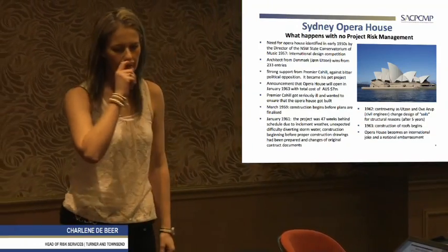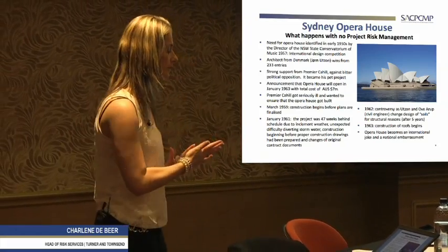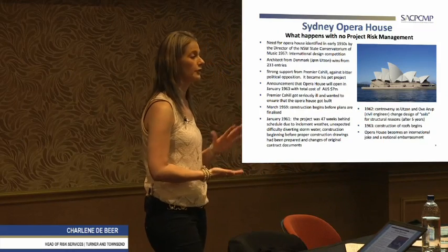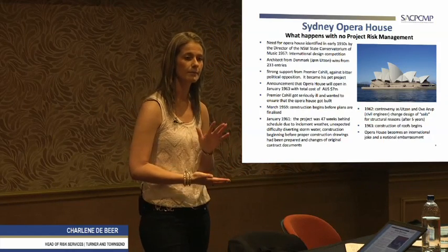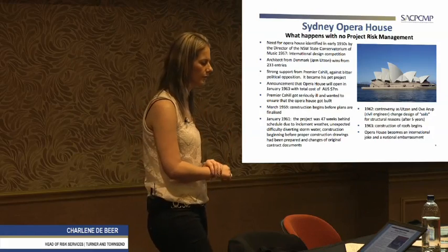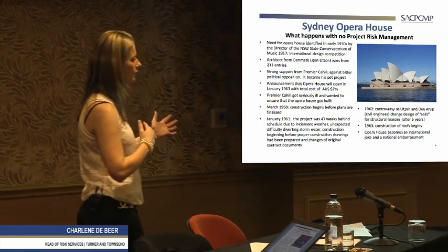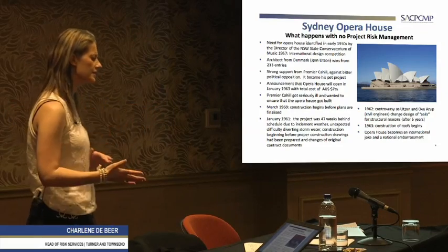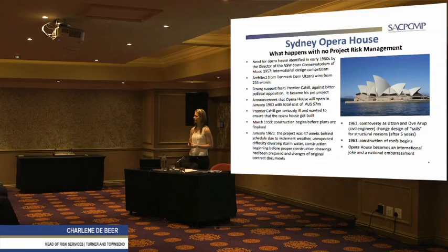So at 30% model review, these guys usually feel from engineering and the client and the contractor side that they need to get this project up and running. They're usually already behind on time, and budget is already under pressure and being constrained. And of course, there's a lot of pressure from corporate and strategy, saying you guys are taking longer than what you stated. So we've got to fly this job. 30% model review is done. First engineering drawings are issued. And of course, the contractor will start procuring, and they'll start the construction on site.